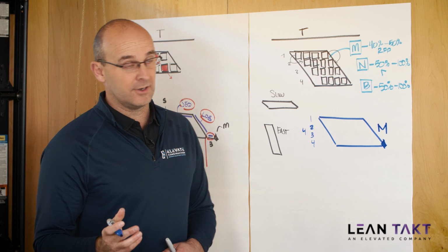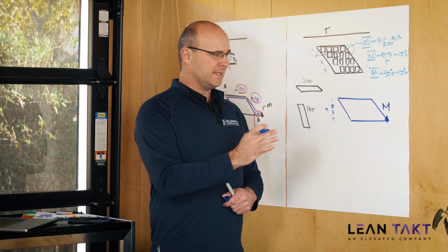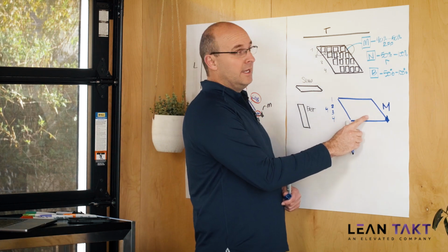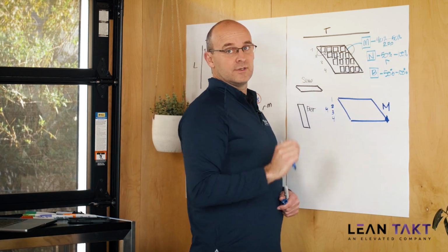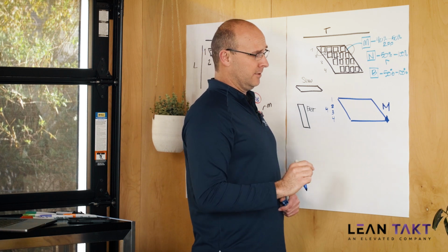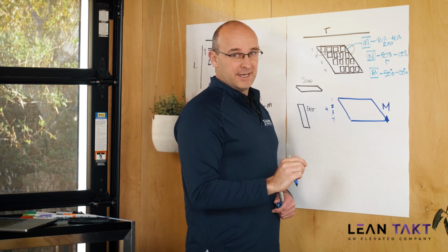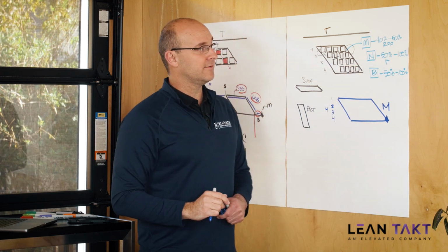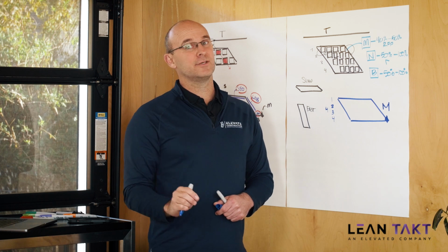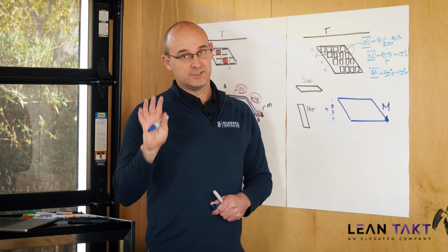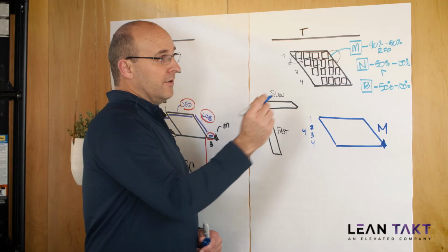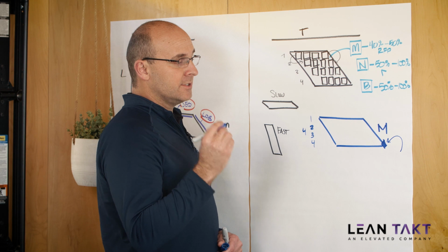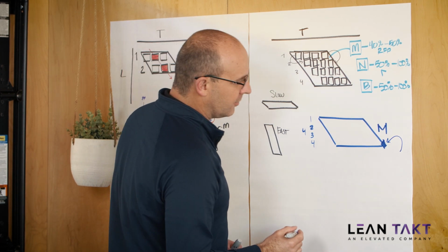Now, all of you owners out there, you're probably thinking, oh, Jason's trying to underpromise and overdeliver. No, no, no, no, no. Mathematically, if you're between a 40 and 50% realized flow potential, that is a reasonable, fair, and competitive speed. And you can actually go ahead and design your schedules based off of that and still win proposals and still blow your owner out of the water, like just absolutely impressed, okay? If you then promise this milestone to the owner, there's nothing wrong contractually with them trying to go faster.